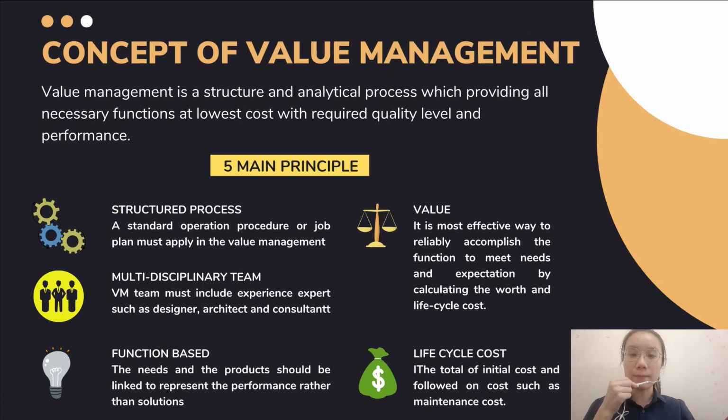I'm going to explain the concept of value management. Value management is a structured and analytical process which provides all necessary functions at lower cost with the required quality level and performance. Value management has 5 main principles, which consist of structured process, cross-disciplinary team, function-based, value, and life cycle costs. Firstly, a standard operating procedure or job plan must be applied in value management.